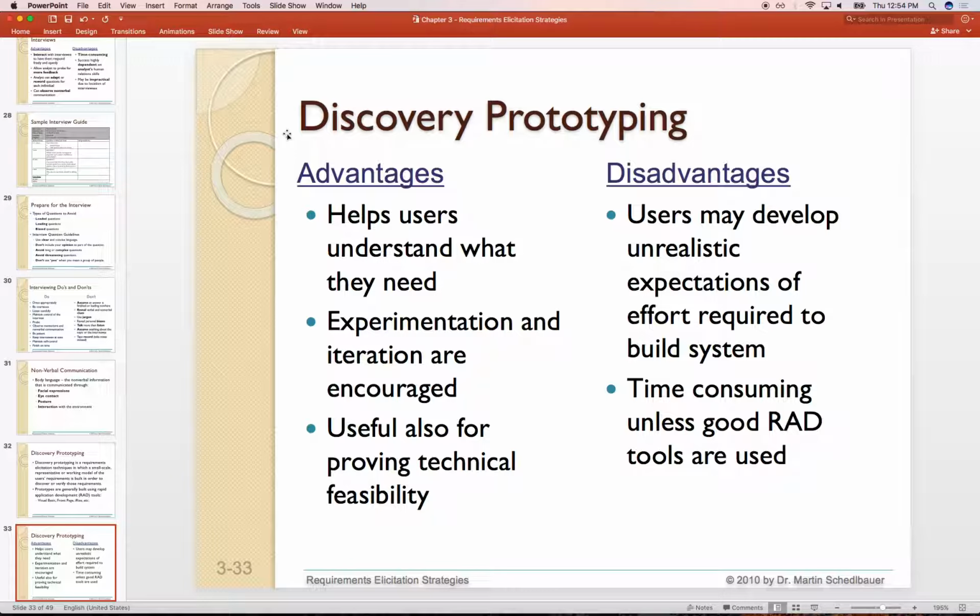and always make sure not to fall in the trap that a prototype might eventually actually become the product. Right? Prototyping is only used for either measuring a risk, eliciting requirements, or checking the feasibility of something. Oftentimes developers are caught in the trap that they started working on a prototype, and then they incrementally add to the prototype.